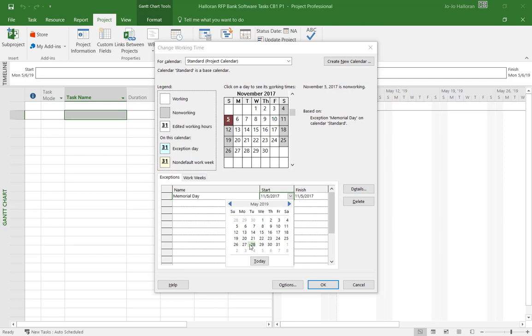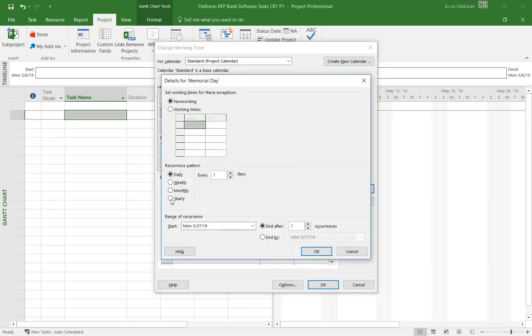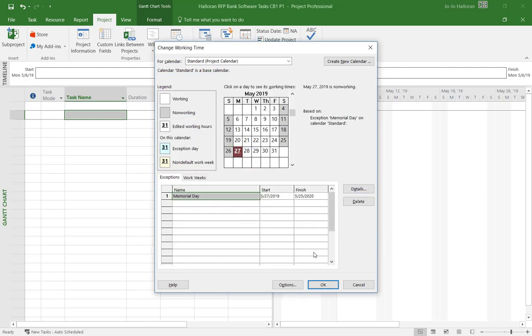Okay, so we've got May 27th, 2019. Okay, and then we want this to occur yearly on the last Monday of May for 2 occurrences. Since we need to do this for 2 years, we're going to make sure the Memorial Day is selected here, and click on Details. Okay, and we're going to do a yearly recurrence, and we are going to change that to the last Monday of May. So we're going to change this here to the last Monday of May yearly, and we want to do it for 2 occurrences. So we're going to click the little up arrow, and it will be for 2 years, so 2019 and 2020. So go ahead and click OK.